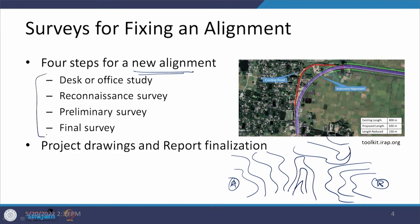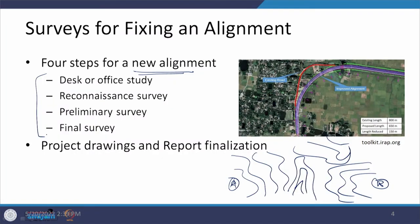The first step we are going to talk about is an office study or desk study, where we try to rely on readily available information in terms of different documents and try to identify the possibilities — whether there is a possibility of going straight or in some other fashion. Then we go to the next step, which is a reconnaissance survey, where we gather further information on all possible routes or alignments between locations A and B.